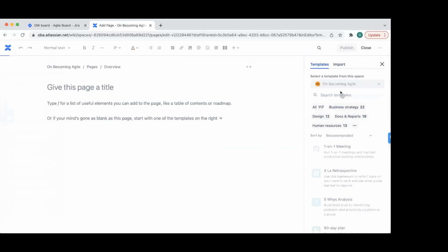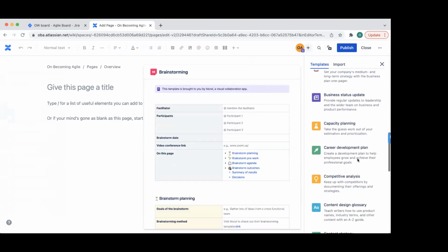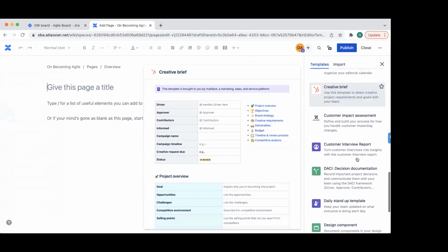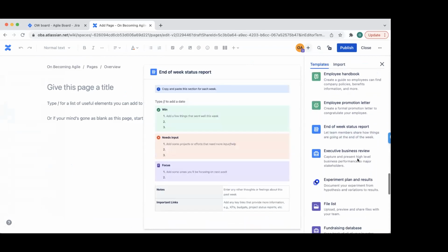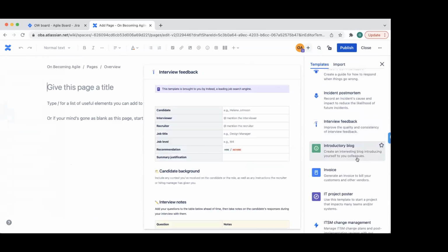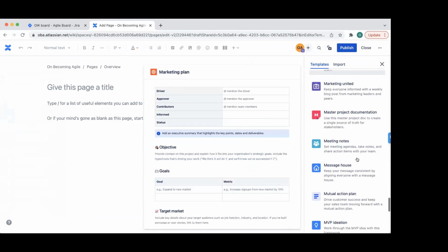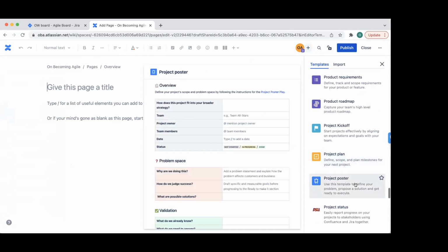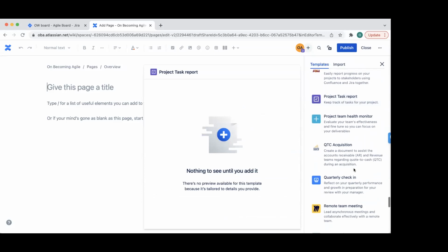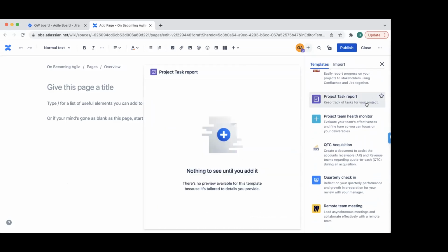What I was looking for was that team calendar because I know that's been very helpful. You just tell your team members to go to Confluence and put in their planned out of office. Because as Scrum Master, you want to know who's planning to take time off, who's available this sprint, who's available next sprint, who's not available, especially when too many people are taken out of office. So when they all go into the team calendar, they'll be like, oh, okay, this person has already applied, so maybe I cannot take this date because everybody cannot be out at the same time.